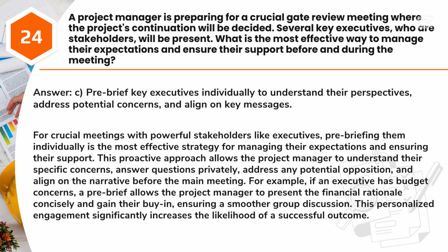Answer: C. Pre-brief key executives individually to understand their perspectives, address potential concerns, and align on key messages. For crucial meetings with powerful stakeholders like executives, pre-briefing them individually is the most effective strategy for managing their expectations and ensuring their support. This proactive approach allows the project manager to understand their specific concerns, answer questions privately, address any potential opposition, and align on the narrative before the main meeting.